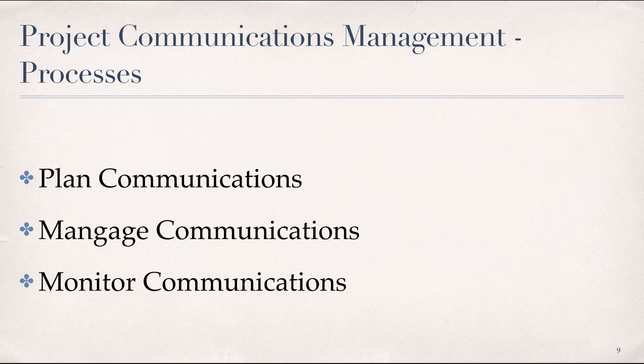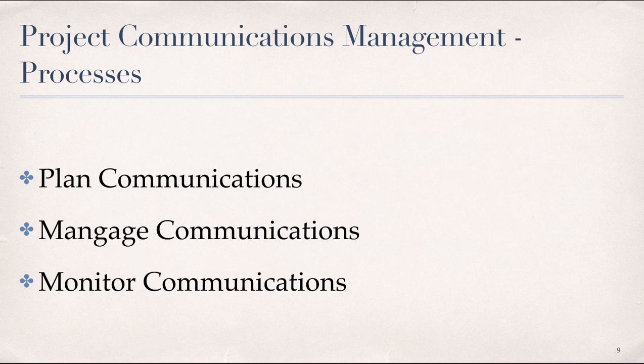And then finally is monitoring communications. This process ensures the information needs of the project and its stakeholders are met. It should be noted that project communications management is implicit in every project life cycle and is an explicit requirement of the planning, executing, monitoring, and controlling project management process groups within the PMI standard.